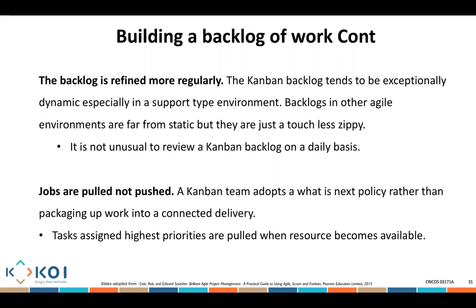Now, jobs that are on the backlog are not pushed. Nobody could say to the team, here it is, go and take this and work on it. That's not how it works. The team will come in, look at all of these backlog items, look at the priority, and read out each of them. Say, okay, do I have enough information to accept the highest priority backlogs? Yeah. How many of these stories can I deliver?